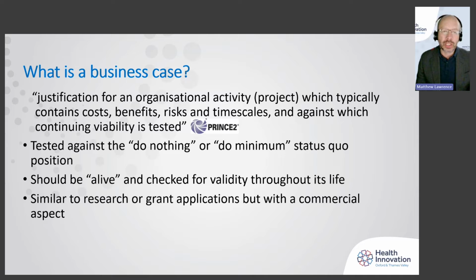And what the NHS and public sector typically does is they test it against the do nothing or do minimum status quo position. Essentially, if we didn't do anything, what's the difference? So does this actually make things better? Will it make it the same or will it make it worse? And typically you want it to be better in some regard. So in savings, in patient outcomes, in safety, and something has to be better and sufficiently better to make the effort worthwhile. And it should be alive.